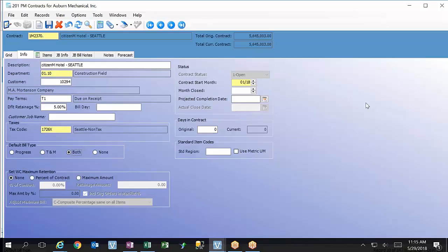And typically that's because somebody over on the operations side has said, oh, we're almost done. We're probably not going to post much anymore. There shouldn't be any more costs coming in. Then over on the accounting side, they changed the status over in JC to soft close because you can do it over there. You notice here in PM, you're not allowed to do that. It's only on the JC side. So it goes from pending to open here. Those are the two. Over on the other side, you can manually change it to soft close, but you can't change it to closed manually. You have to run a process over there.